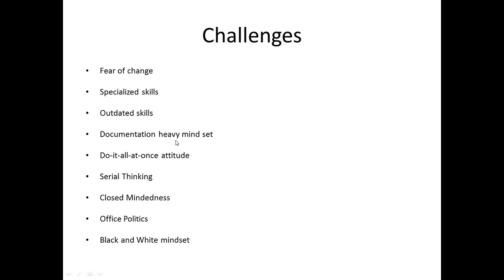You can have the product owner, the Scrum master, the team, and the different types of meetings required, like daily stand-up, review meeting, retrospective, and so on. Those are more on the management side. Now coming to another agile method, extreme programming, there you get continuous integration, pair programming, and test-driven development practices. Those are more related to how you build the application or do the testing, so they are on the engineering practices side. There are different scenarios where you will go for each, and you can mix and match. I have not seen a single team that follows only Scrum without any XP practices, or only XP without any Scrum practices. They use a combination of both.